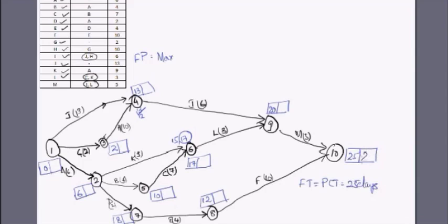Now in the backward pass, we start from the completion time of 25 days as the latest completion time and move backward. There is just one path from node 10 to node 9, so it is 25 − 5 = 20. Moving to node 10's other path: 25 − 10 = 15. Then 15 − 4 = 11, and from node 9: 20 − 3 = 17. Going backward to node 4: 20 − 6 = 14.